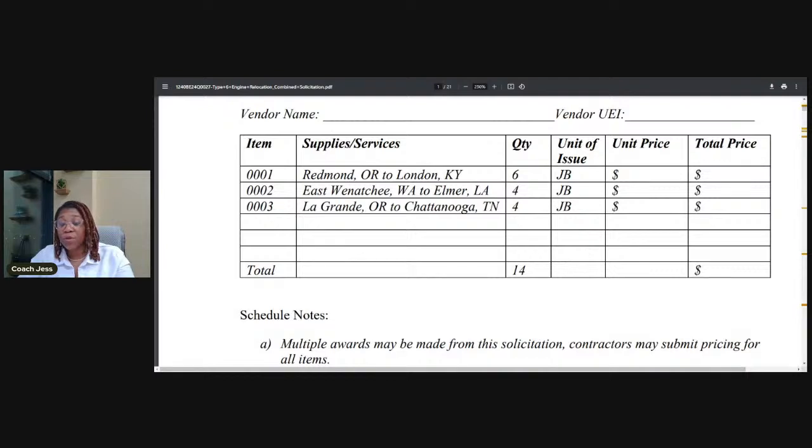When your sub gives you the cost of what it's going to cost based on these jobs, then you know you're going to put your price on top of that. And that is what you will put here. I call it the government rate. Your government rate is the all-inclusive rate with what it would cost you for labor, meaning your sub. And after you've calculated what your cost is, your cost should be a compilation of your expenses and your profit minimally.